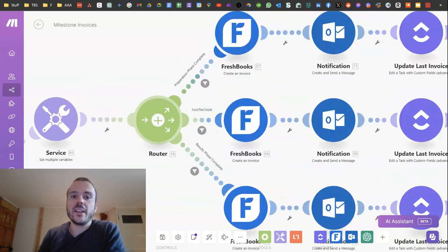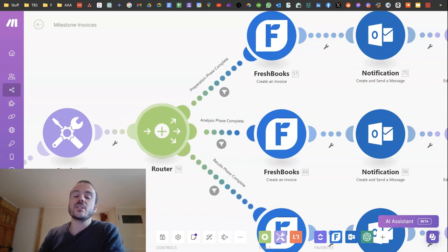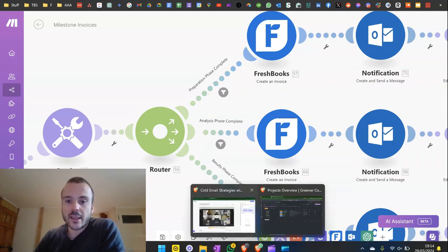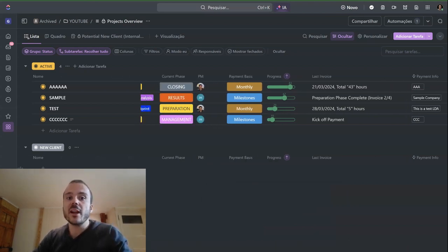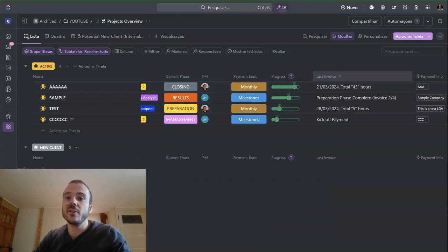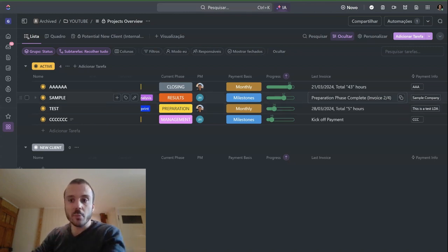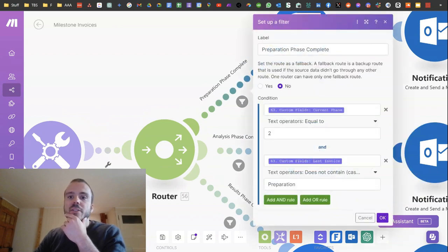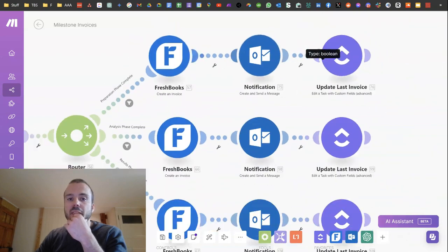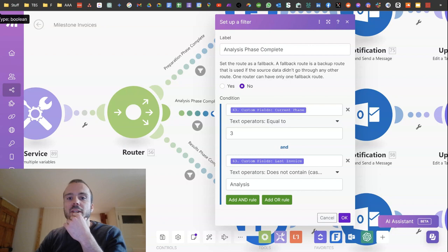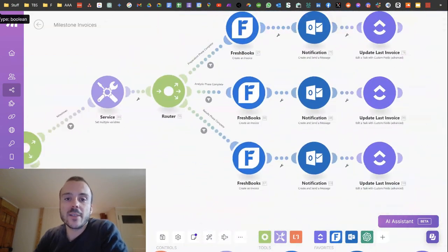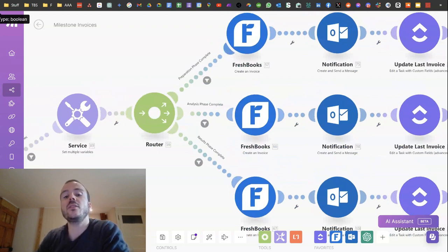There's a variable setting — not very relevant, just because ClickUp doesn't give me a custom field as I'd like. Then we have a filter which determines whether we have reached a milestone or not. These filters get information from ClickUp and check if we are on a certain phase and the last invoice still doesn't reflect the phase we just accomplished. For example, if the current phase is phase two and the last invoice doesn't contain 'preparation,' you follow this path. If the phase is phase three and the last invoice field doesn't contain 'analysis,' you create that invoice, and so on.